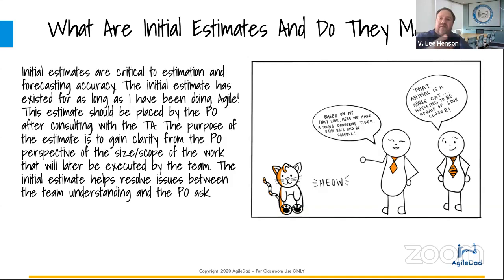So one piece of advice there that I use is I will use this initiative to help determine. If I'm going in and I'm trying to figure out how many points a team can do, I might take the last 3 sprints of work after they're finished working on it, get them to t-shirt size it, and use a comparative chart to show them how long it took versus what the t-shirt size was. So that way they can get their head around why I'm trying to use size instead of using time. And I found that that's quite effective. So that works really, really well.